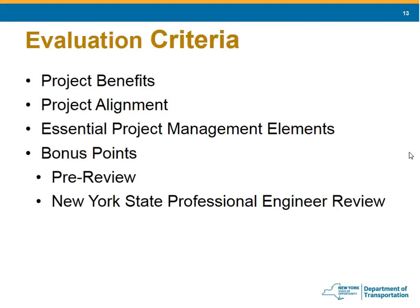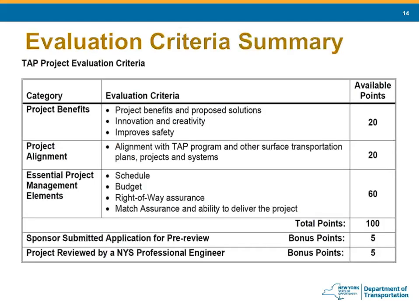The three categories for each program are the same: project benefits, project alignment, and essential project management elements, but some details vary by program. The most important component is the project management elements, which are worth 60 points — schedule, budget, and the ability to deliver the project. All components of a successful application are included in the guidebook and appendices, so please include all necessary information so your application scores well. Details for TAP evaluation criteria can be found in Appendix B.